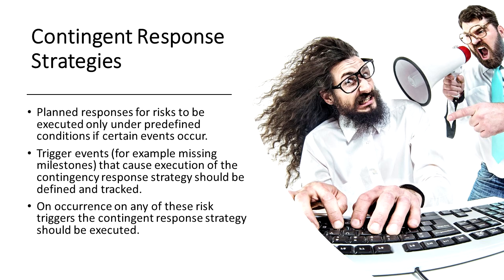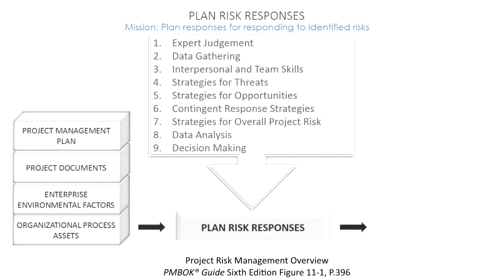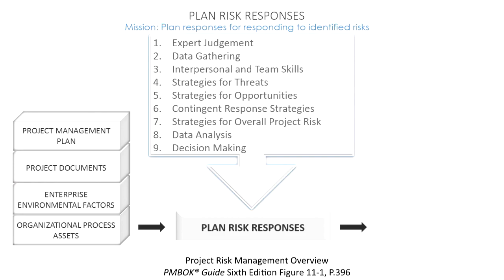Now there's a term that is often mixed with contingency plan and fallback plan, and this term is called workaround. A workaround is not a fallback plan or a contingency plan. A workaround is a response to a risk that was not conceived of at the time the risk occurred. A fallback plan is conceived before the risk occurs. So at the time the risk occurs, if you don't have a plan and you're scrambling around looking for what to do, we call that a workaround.